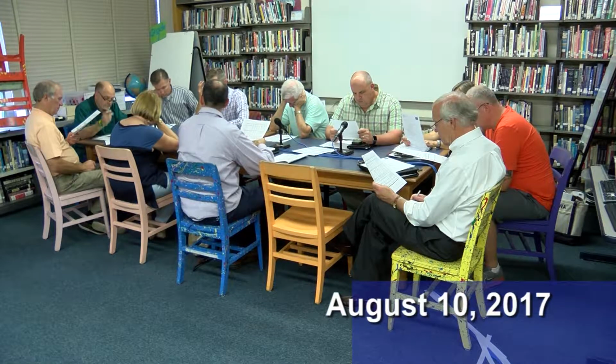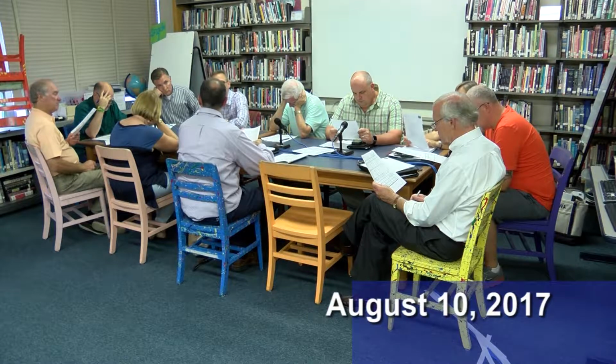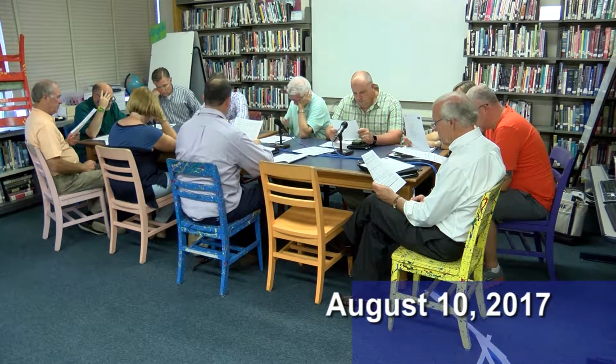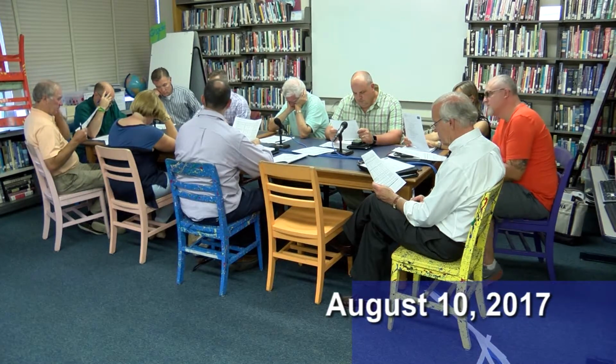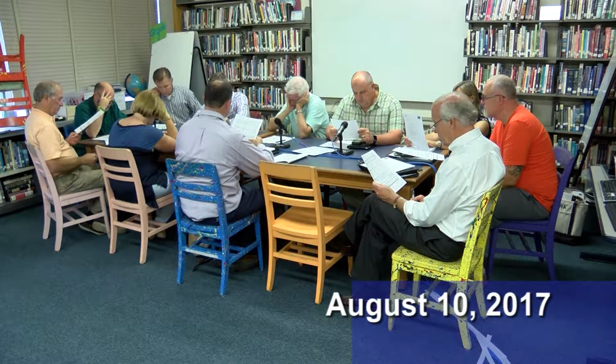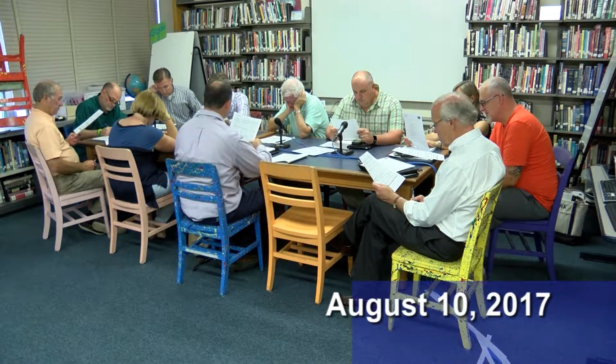So there's still funds that have not been contracted. We haven't purchased furniture. We haven't purchased all the different services we're going to need that get purchased along the way. But so far we have commitments for just under $28 million. The 34 includes the 2 contingencies. Yes. Yeah, 34 is everything.